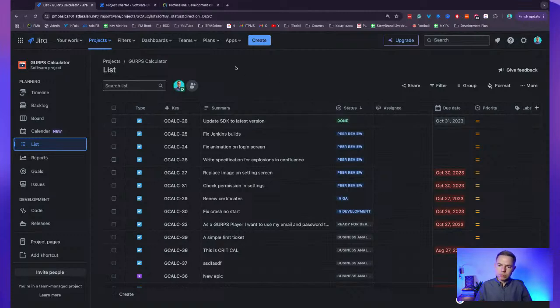You include risks as Jira tickets, and you implement and estimate risk response plans as tasks. And they become valid, transparent work that goes into each and every sprint. Okay, good. So this is covered.